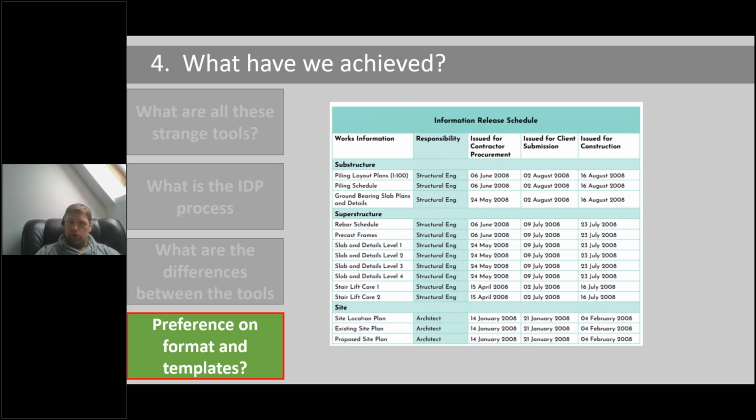So this was a tool, and I took a lot out of it because obviously you can only show so much in the guidance, but it was to show how you plan your deliverables out and you get an agreement with those task teams, those delivery teams, to say what you're going to give me and when. And this all had to be agreed before the information got handed over. So what this is trying to do is provide context: how you can use old tools and enhance them to be more specific to ISO 19650.